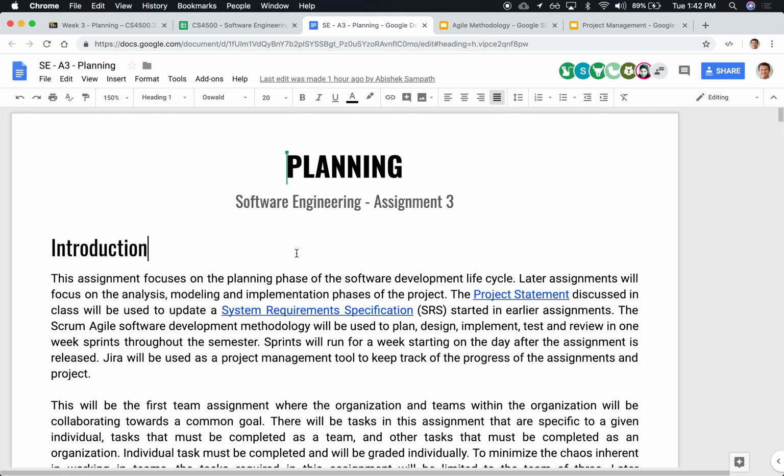As you know, a lot of the stories and tasks that are listed there will be very high level with very minimal detail, and some of them will be with lots of detail. So there'll be a lot of different tasks at different levels of detail. Not until we decide that, yes, we're going to focus on this particular set of features, would we go in and hash them out and find out what the details are about a particular story.